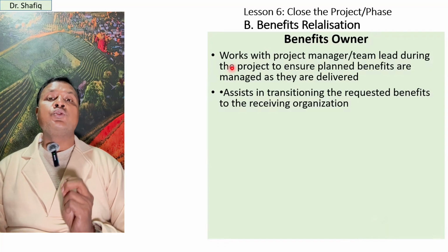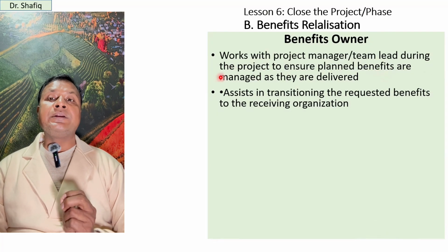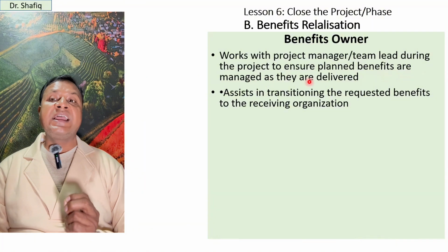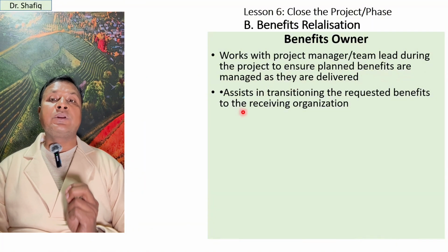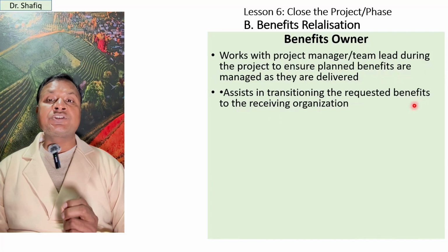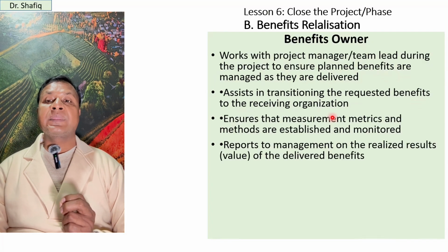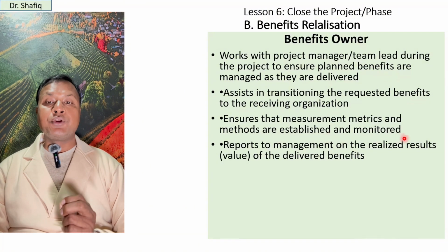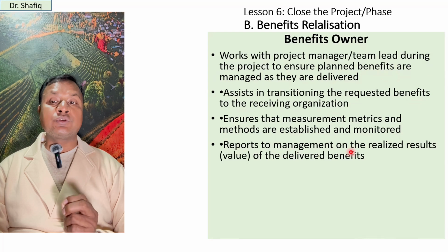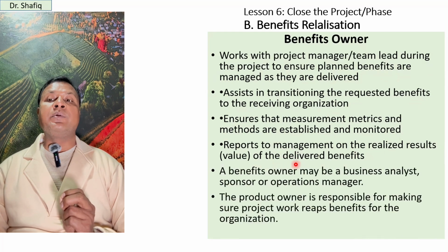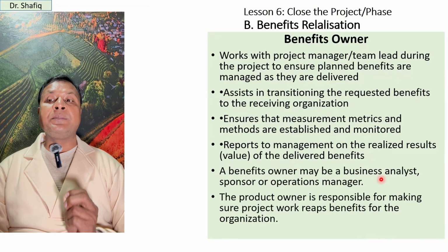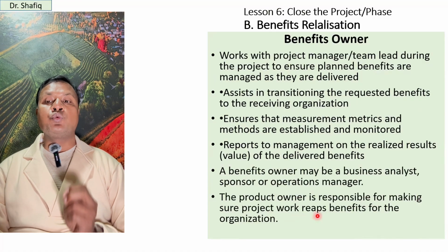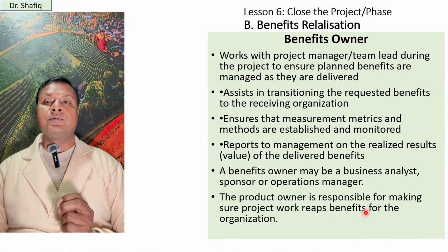So the benefit owner should work with the project manager and team lead during the project to ensure planned benefits are managed as they are delivered. Benefit owner also assists in transitioning the requested benefits to the receiving organizations. And the owner also ensures that measurement metrics and methods are established and monitored. Benefits owner also reports to the management on the realized result of the delivered benefits. So a benefit owner may be a business analyst, a sponsor or an operation manager. So the benefit owner is responsible for making sure project work reaps benefits for the organization.